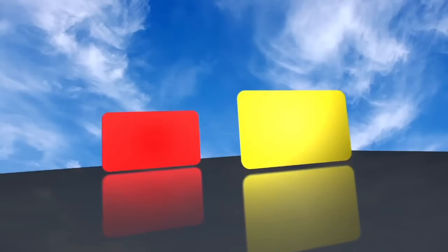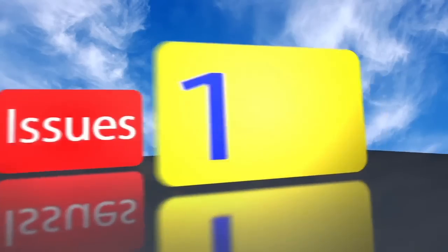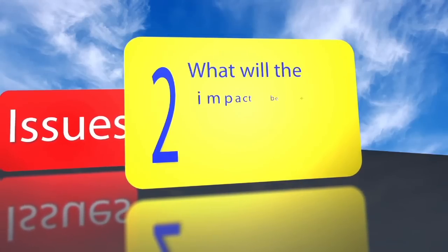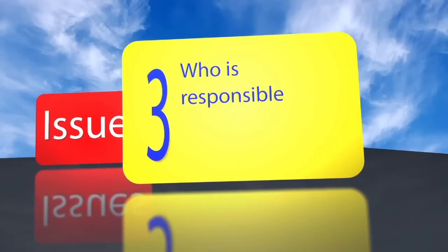When developing a change request, at a minimum, be sure to assess these 4 issues for every proposed change. Why is the change necessary? What will the impact be on the original scope of work? Who is responsible for costs or delays? Who should pay for the changes?